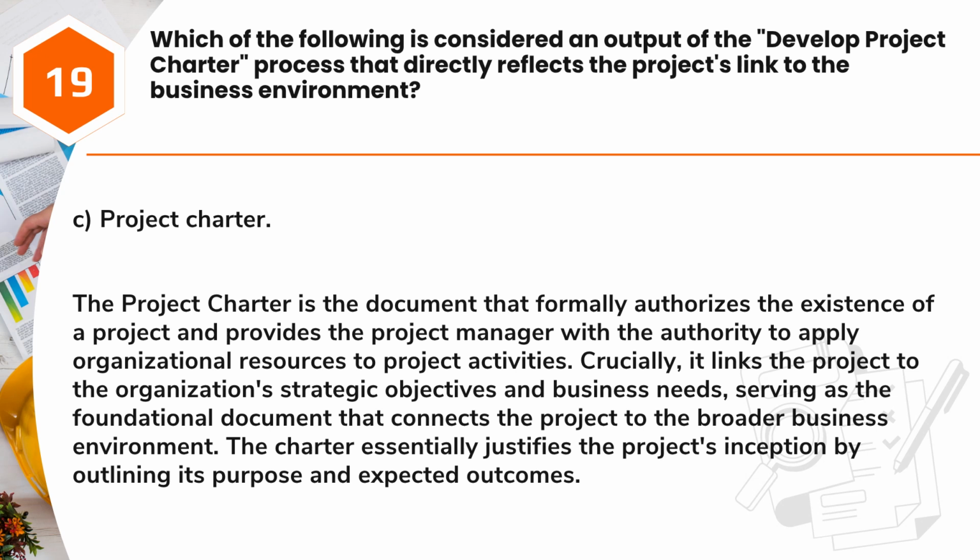Answer: C. Project Charter. The Project Charter is the document that formally authorizes the existence of a project and provides the project manager with the authority to apply organizational resources to project activities. Crucially, it links the project to the organization's strategic objectives and business needs, serving as the foundational document that connects the project to the broader business environment. The charter essentially justifies the project's inception by outlining its purpose and expected outcomes.